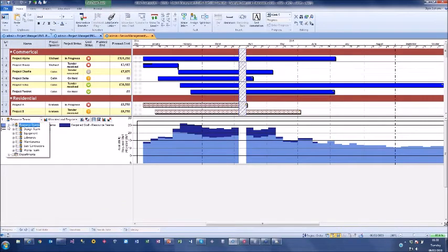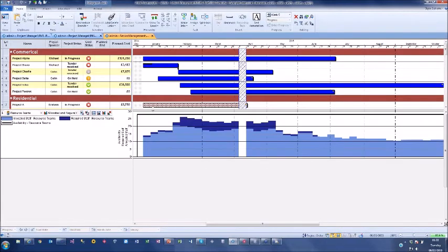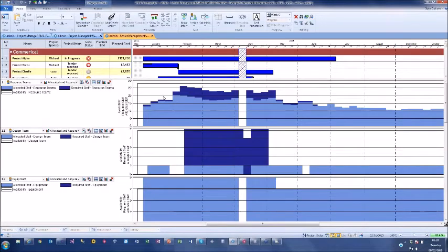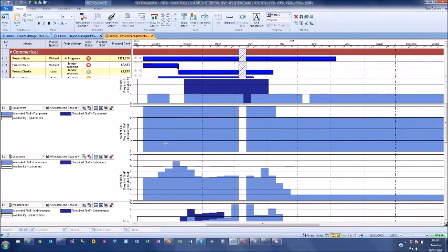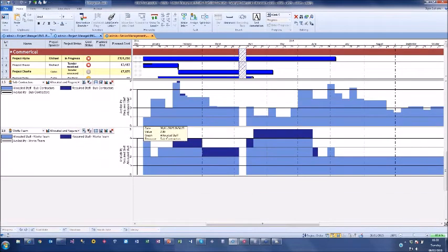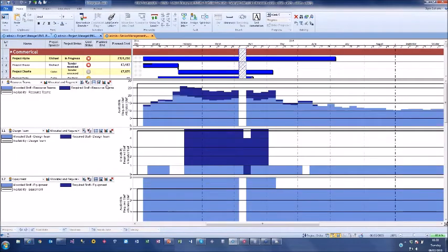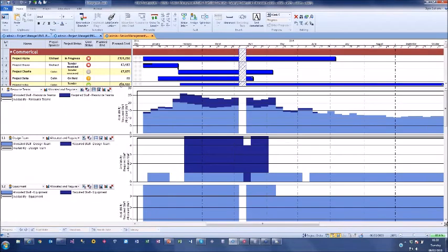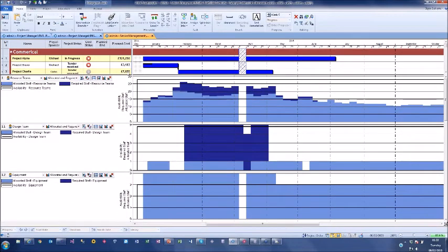This resource team actually has a number of departments inside it, and one of the advantages here, this is now looking across the whole system, and I can quite simply right click and say drill down, and I can now look at the capacity of every team across all my projects. And again, if this is one single mega project, it will be looking across the whole area. But even as a mega project, I would then define each main phase of the project as an individual section, which I could be monitoring individually, but as a whole as well.